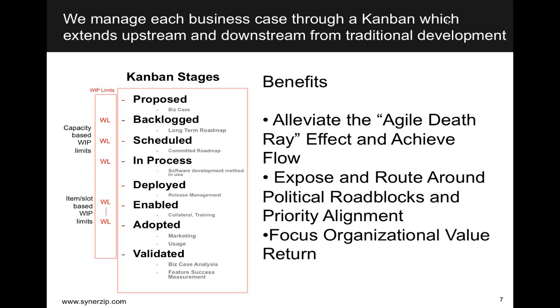So in other words, over the next year or 2 years, you can't externally commit more than 40% of your capacity. Likewise, you may say your committed roadmap over the next 90 days can't be more than 80% committed, so that you still have that agile ability to be flexible while still serving your constituents' interests of knowing what's coming.